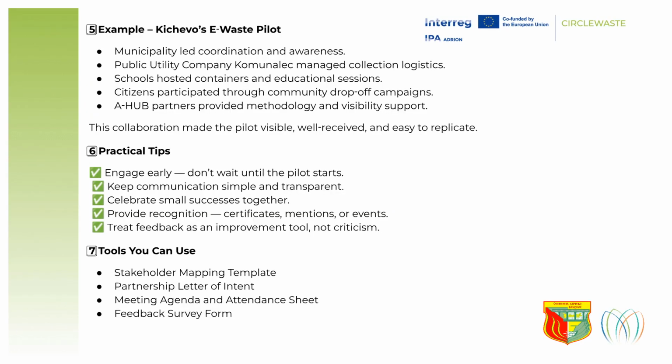In the Kicevo e-waste pilot, the municipality led coordination, the public utility managed logistics, and schools hosted containers. Citizens participated through drop-off campaigns, supported by AHUB partners. This collaboration made the pilot visible and easy to replicate. Practical tips include engaging early, simple communication, celebrating successes, providing recognition, and viewing feedback as improvement.